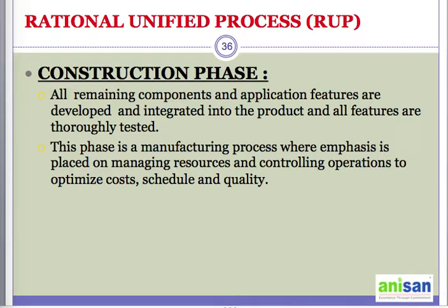While entering into the construction phase, we have to ensure that the system is broken down into components, and each component is assigned some features or functionalities, and we have documented the inputs and outputs of each functionality, and their dependencies and their connections. Okay, so that's how the construction phase will work. And once all the components are documented, they are divided into releases, so that the construction work will start.